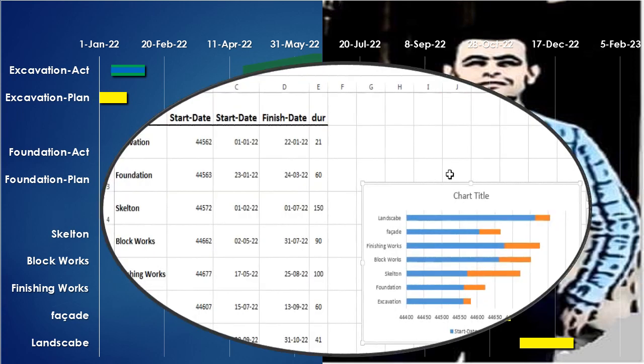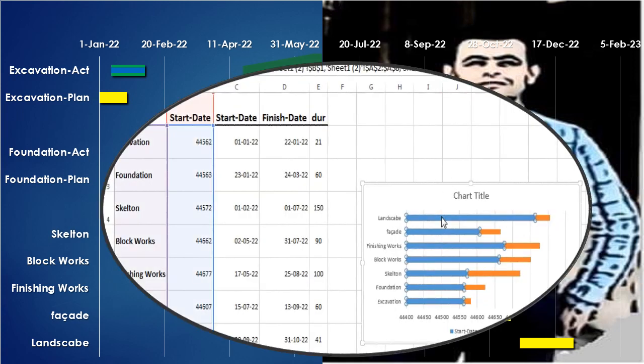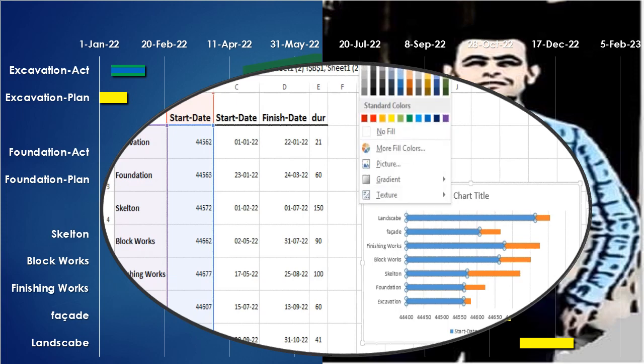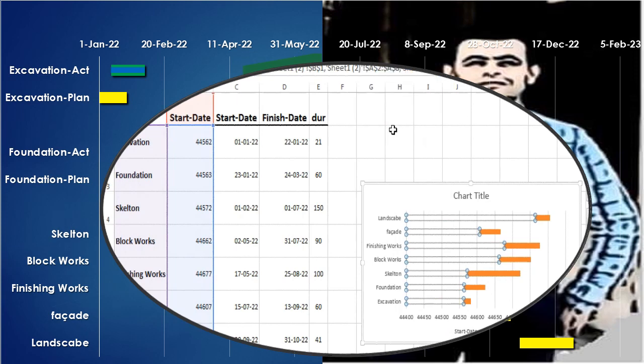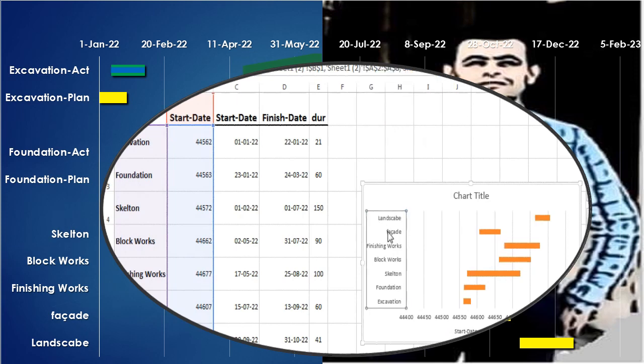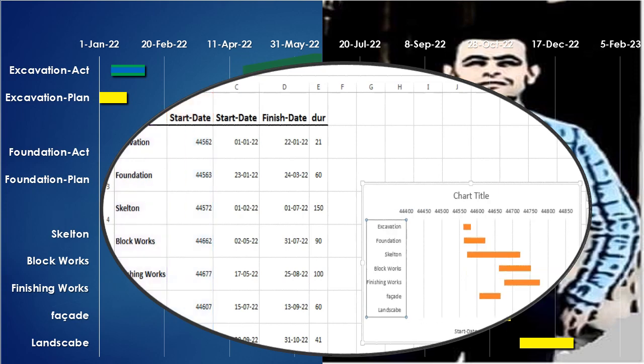By creating a chart for those data containing the work description, the start date, and the original duration, choose the proper type of graph. Now we need some modification in the chart settings to get a quick Gantt chart that represents the plan in the shortest possible time.